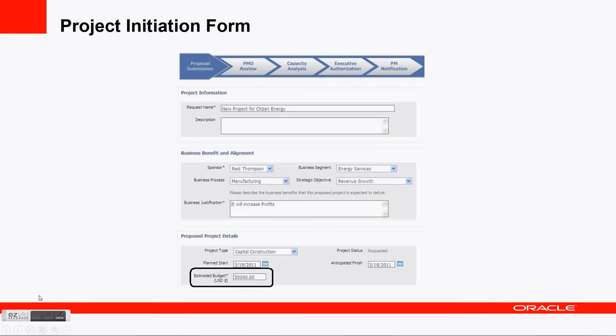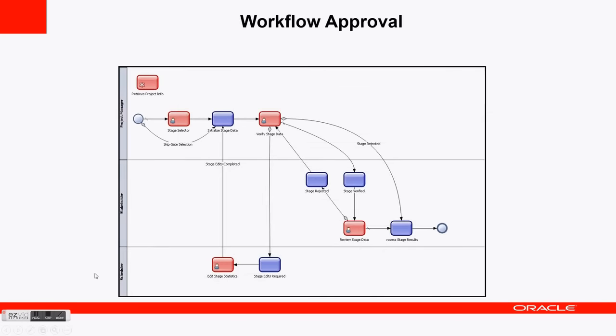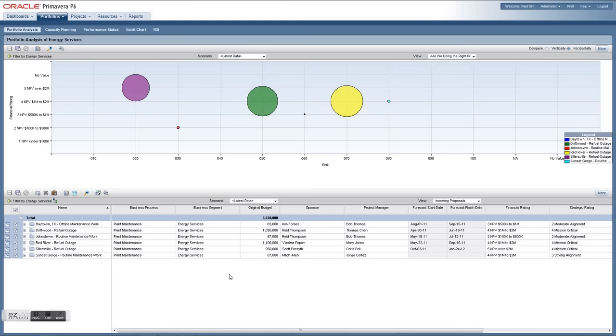The software uses a project initiation form to initiate projects where people fill in key information related to the project, strategic program, costing, and resource needs, which is passed through a workflow approval.